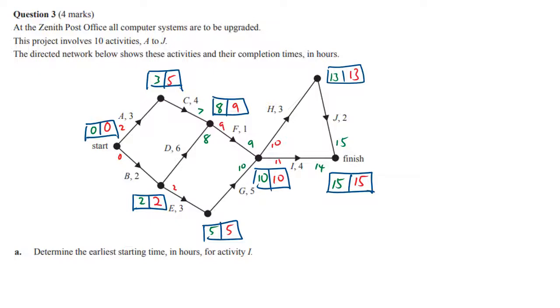We're looking at activity I and we want the EST. Remembering that the EST is the green numbers in my system, the EST for this one is 10. I know my unit is hours, so I'm going to write 10 hours.